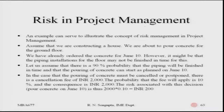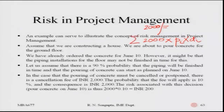Let me briefly discuss how dependence and independence come into the picture. If the one-day cost is two thousand, the total cost is the sum from day i equals one to ten of two thousand multiplied by the probability PI of failing. However, the probabilities, number of days, and rate of payment may not be independent of each other. It may happen that the customer has a clause in the contract where for delays of the first five days the cost is two thousand rupees per day.